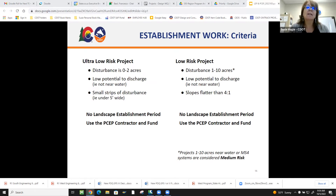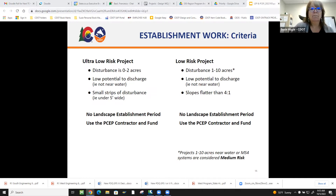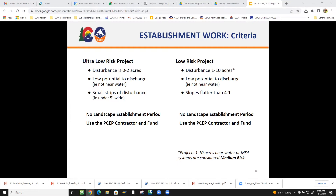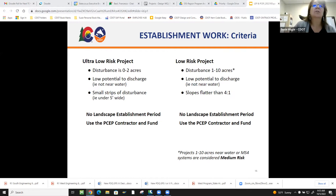For low-risk projects — one to ten acres, low potential to discharge, not near water, slopes flatter than 4:1 — we would also do no landscape establishment period and go straight to PCEP. Please note: if we're talking about MS4s and near water, we kick it up to medium risk. A question was raised about whether this has made it into stormwater plans as pay items. The answer is it's still considered 'extended landscape preservation' as the pay item — we'll get to that in tips and tricks.